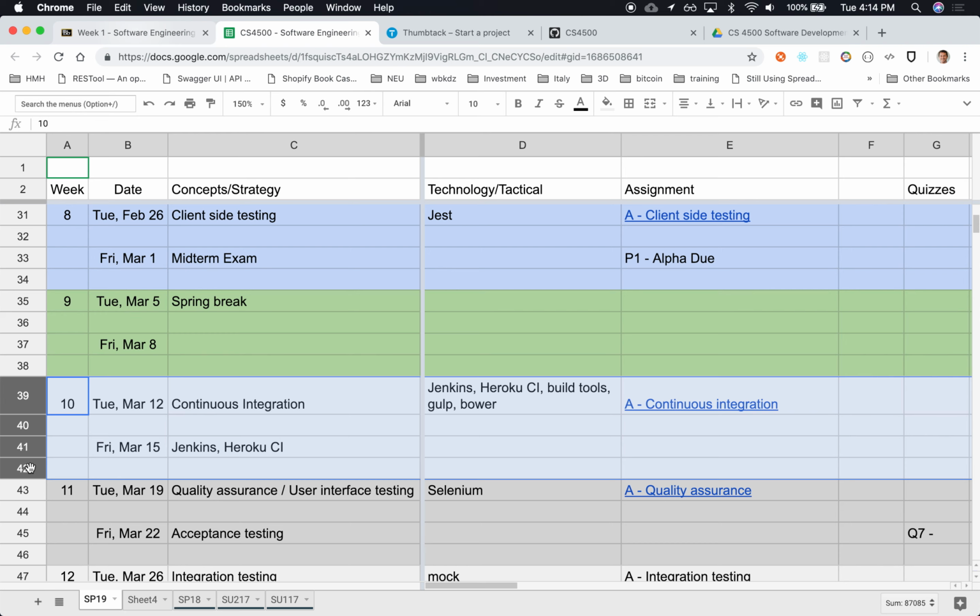For this project, we're going to be choosing one-week sprints. I don't like one-week sprints. I feel they're way too short. But we are in academia. We only have 14 weeks to do this, so we're going to have to deal with small bites, small increments every sprint. So we'll keep everything that you need to build that particular week small enough that you can actually complete it that week. All right.